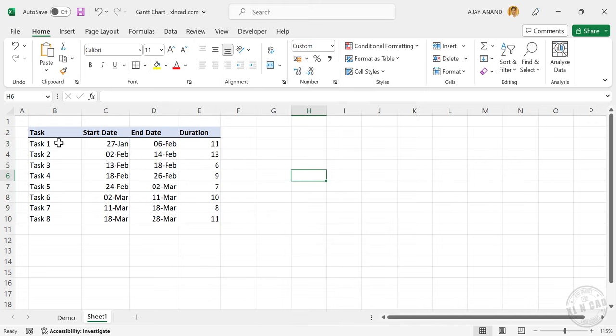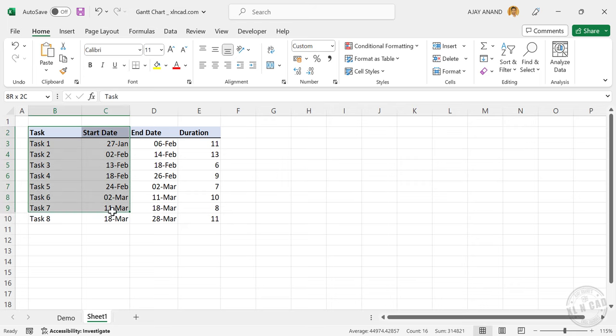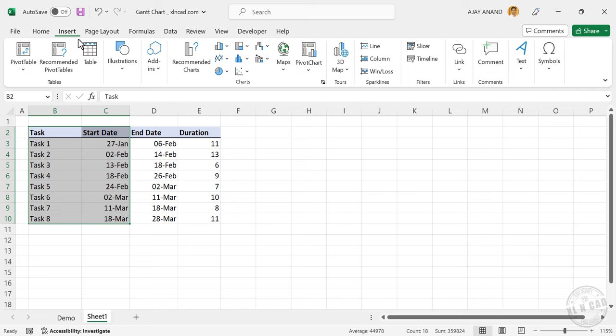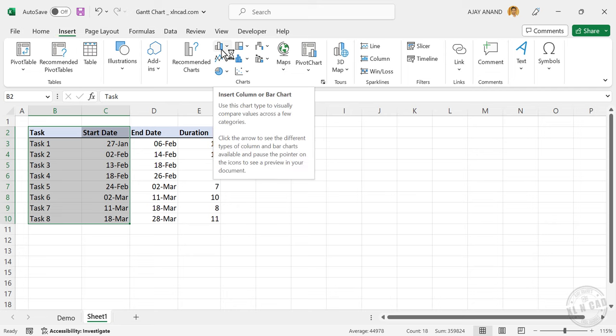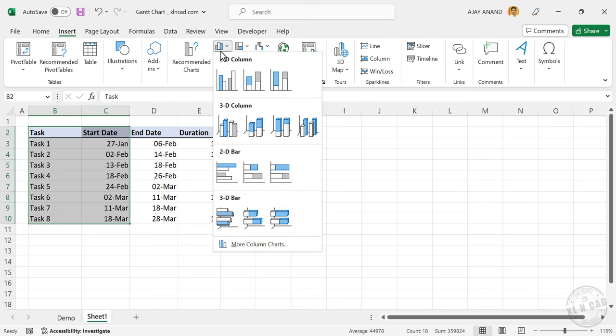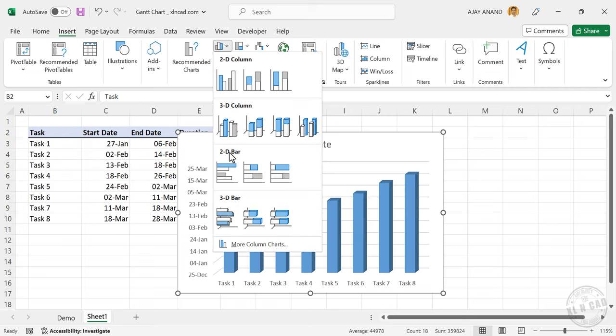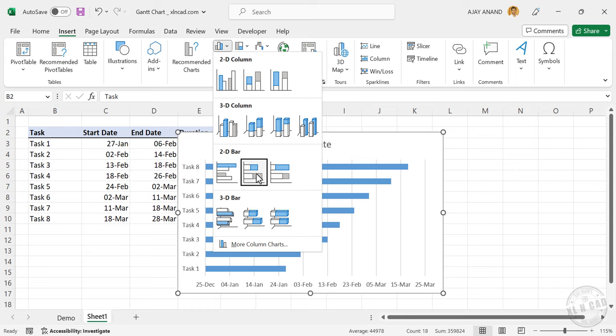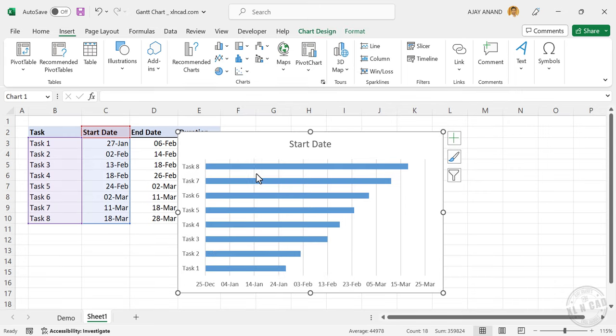Now to display this data as a Gantt chart, select the first two columns of this table. That is the column containing activities and start dates. Go to the Insert tab, insert column or bar chart, 2D bar, stacked bar.